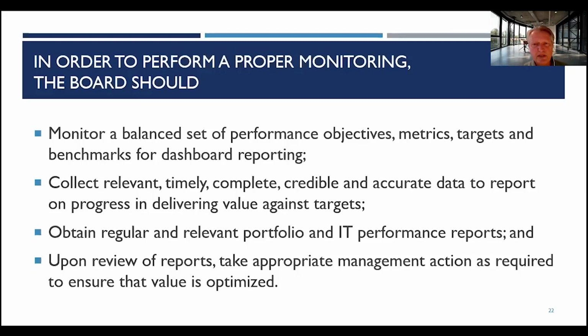A lot of times this goes through the portfolio management office. So there we have people that go to the project managers. They collect information on how well the projects are doing. They create a dashboard, they measure it, and they communicate to a steering committee, or they communicate it on to C-level, depending on how your IT governance system is in place.